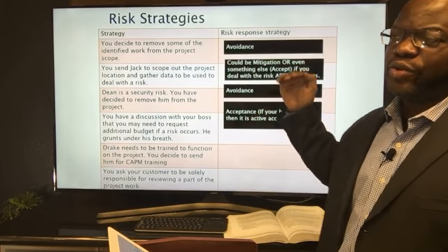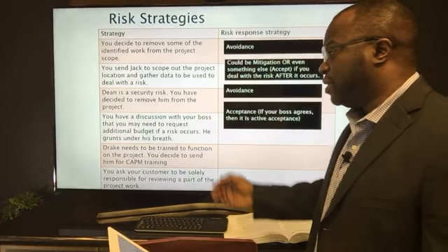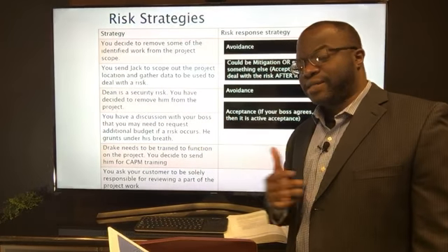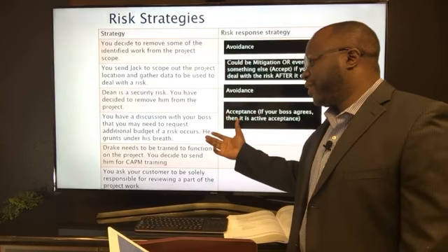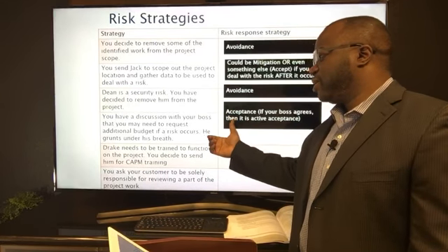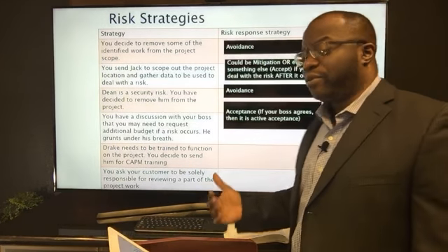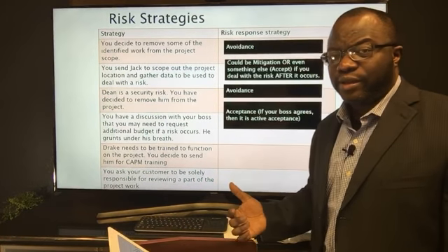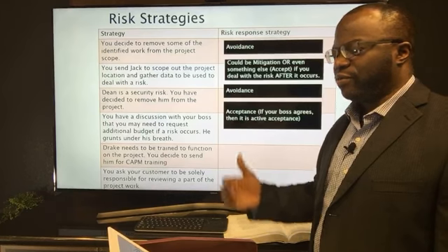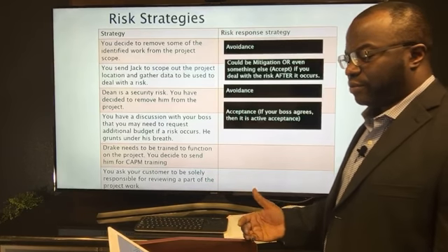So going to another degree of understanding, there's a difference between, oh, I accept versus I actively accept. Passive acceptance is doing nothing. So he grunts under his breath. Well, we don't know if he's going to give you the money. If he gives you the money, then it's active. If he doesn't give you the money, he says, I'm not giving you anything, then that's passive. All right?